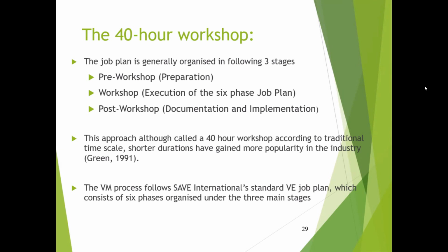This value management process follows the SAVE International Standard Value Engineering Job Plan, which consists of 6 phases under 3 main stages.